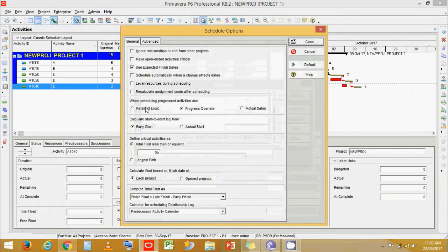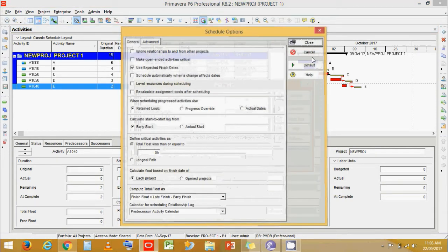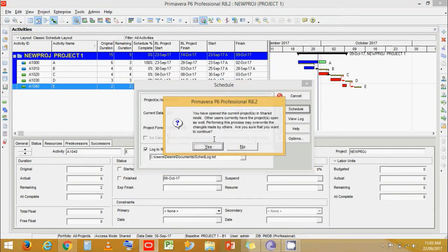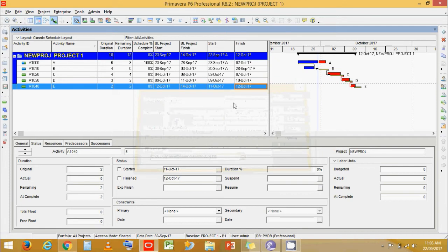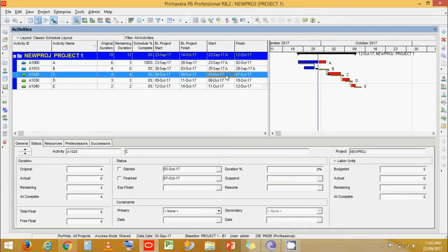Now go to Schedule, then Options, and select Retain Logic, then schedule it. We can see that as per our original link, the project now finishes on 12th October. Activity C now starts on 3rd October instead of 30th September.